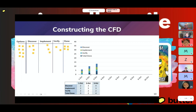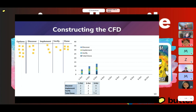Going one more day, we now have four items done total. Where people sometimes get a little mixed up is saying, 'I completed two items from October 2nd to 3rd.' But the CFD is capturing the total completion — that's where the 'cumulative' portion comes from. It's an accumulation. So you're not graphing just the fact that you completed two items, but you're actually graphing the total completed.